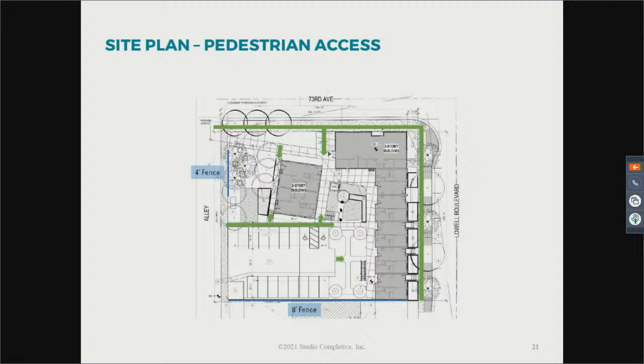Yeah, thank you, Nathan. This is Heath Klein, City of Westminster Transportation Engineer. And thank you, Dino, for asking about the alley. With this project, we're going to assess the existing structural stability of the alley and whether or not it makes sense to do some sort of resurfacing in addition to the widening, to ensure that we have 20 feet of asphalt so that two vehicles can safely pass from 73rd down and into the parking lot of this development.